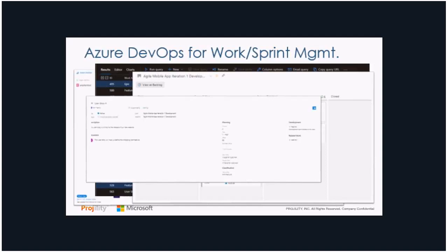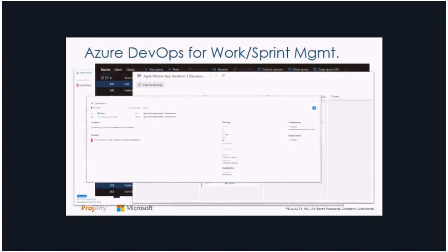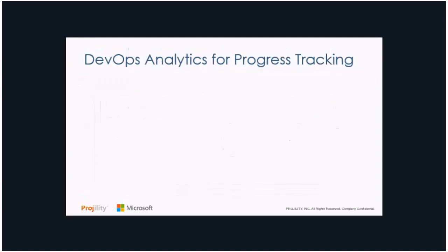We are getting to a point now where we can pull data over at a certain summary level if it's updated in the DevOps tool. So in one of our future webinars, we're going to show you an example of that automation. But that's automation that will work, that will give you some value versus having to map it over to an epic or a feature level, which we don't recommend down here at a task level. There's just too much detail, and Project and DevOps and Jira think in a very, very different way when it comes to tasks.